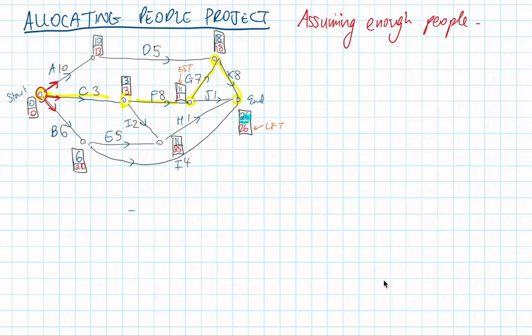Now, a person only has a pair of hands, and how many jobs could you work on at once? It probably stands to reason you can only do one at a time. So job A may take you 10 hours, so you need 10 hours of work. So if you are just one person working on job A, then here's a problem, right? Then who's working on job C? So if you're only one person, then you know that the minimum completion time is going to be affected. So it's sort of hidden, but we're assuming we have enough people for all the jobs.